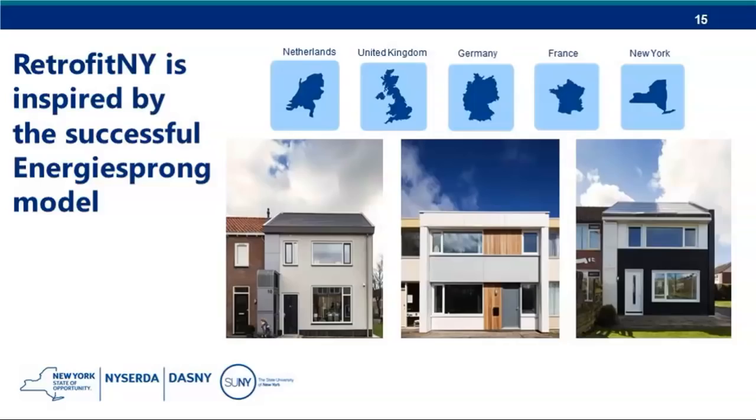They basically come in there with a laser scanner, scan the entire building, do the majority of the construction off-site, and then install it in about 1 to 2 days on-site. So when Jody said the solution that we're going to be targeting should be replicable with residents in place, even though we're beginning with a gut rehab, this is the precedent for that actually being possible.